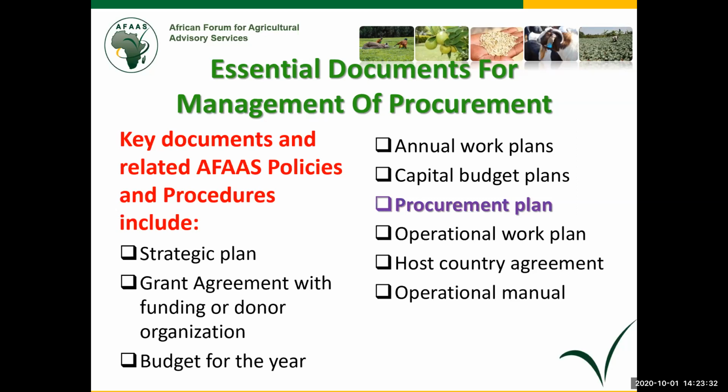We have always taken concern about the grant agreement with the funder, with the donors. That's why at times we go and find out what are the ineligible expenditures. The moment you bring a procurement which is ineligible, as per the grant agreement, of course, we shall advise you and say, no, we can't proceed with this because we shall be caught on the way.